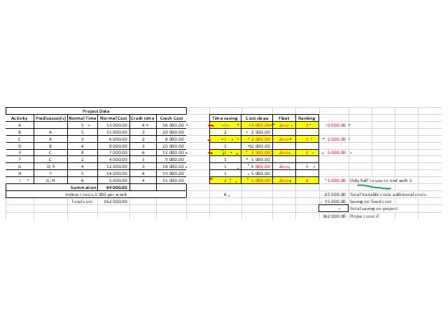So we've got our additional variable costs that we calculated. You will see only half is used, that's why it's there. And our cost saving is 5 times our 3 weeks here. So we have a saving of 15,000, we have an addition of 15,000, and thus we have a cost implication of 0, and our project cost stays at 162,000.